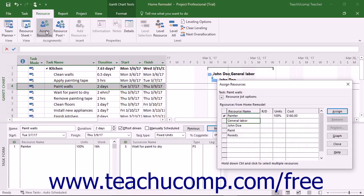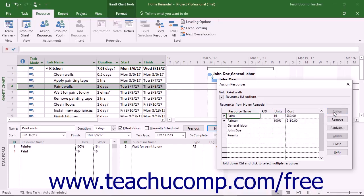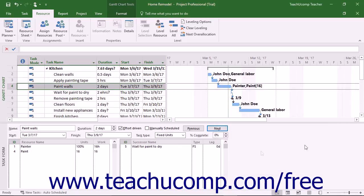Then enter the number of units of material used on this task by typing the number of units used into the Units column for the material resource used by this task. Then click the Assign button in this dialog box to assign the material resource and units to the selected task. Click the Close button in the Assign Resources dialog box to close it once you are finished.